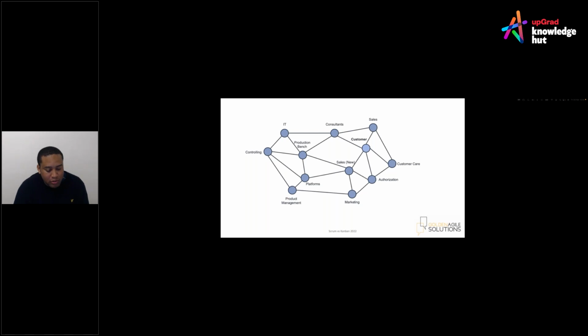And Kanban could also be fantastic in that regard, but even more so when you've got a ticketing system and you're just picking up the next work once you have capacity. Okay, so the capacity in Scrum is when you get to the end of your sprint and you're ready to start a new sprint. Capacity in Kanban is when you've just got capacity in your WIP limit. So a fantastic question there. Thank you, Rose.